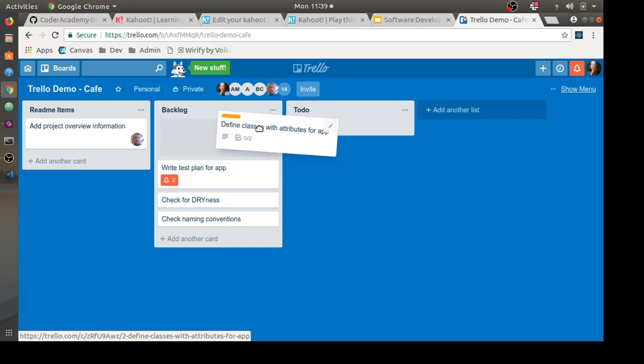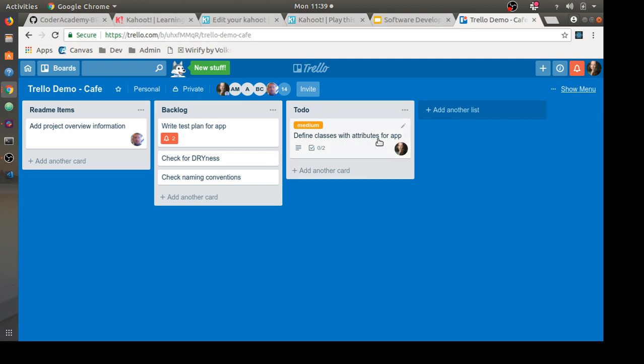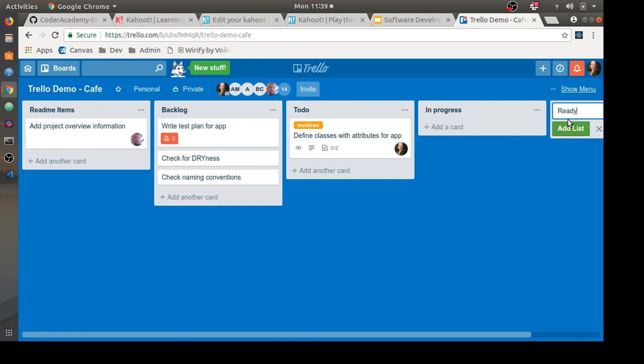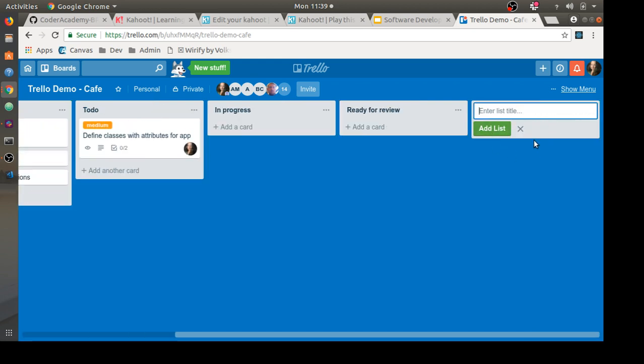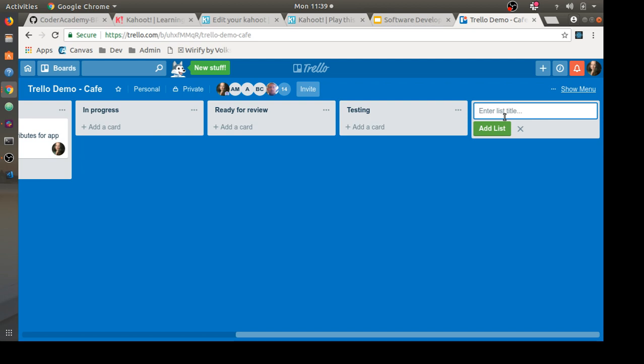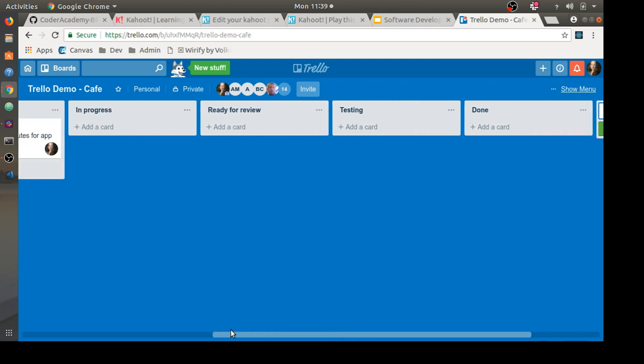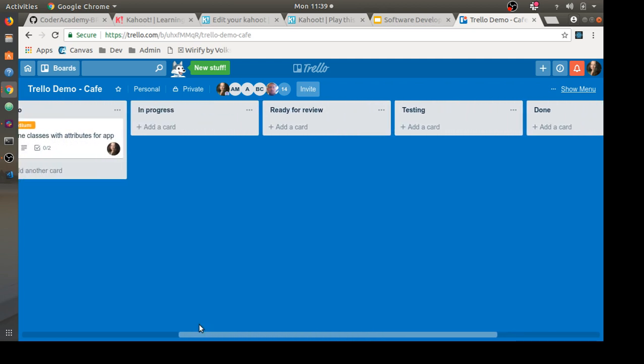And then we'll say, okay, all right, I know I'm going to work on that now. Janelle's going to work on that one. And if we look at the card, 2 hours, so we expect that to move to in progress when I start working on it, and then ready for review when I'm done with it, and then testing, and then done. So the idea here, and you don't have to name them exactly this, but you want to represent these parts of the process that we talked about in the workflow.